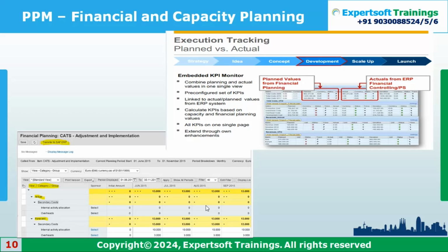So if you are working on any CPM projects, we try to integrate those CPM projects with our BWIP. BWIP is a search engine. It will pick all your master data, and based on the cube level, whatever values have been entered into that master data will be picked automatically. From that you can do the forecasting based on the actuals, the ETC calculation or EAC calculation, everything. And once you get an okay, the value will be populated over here.